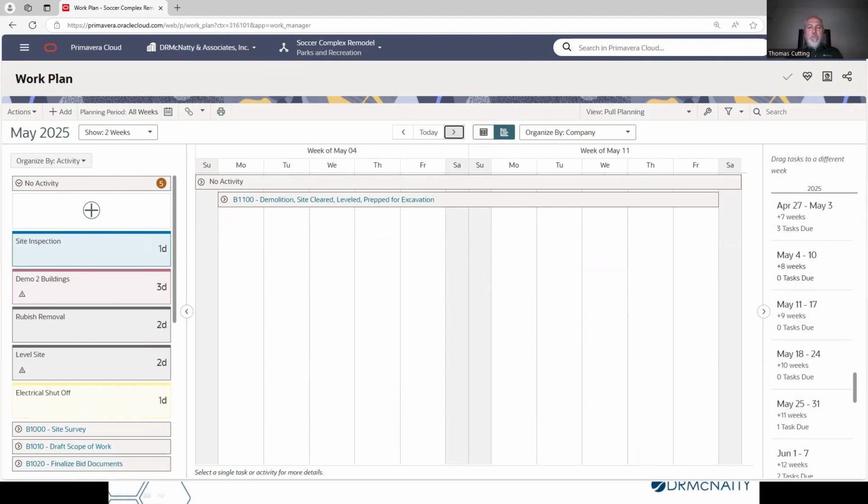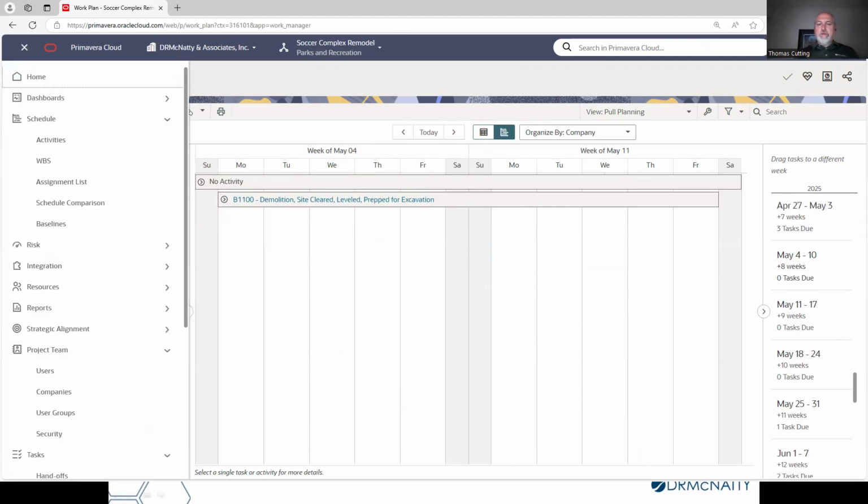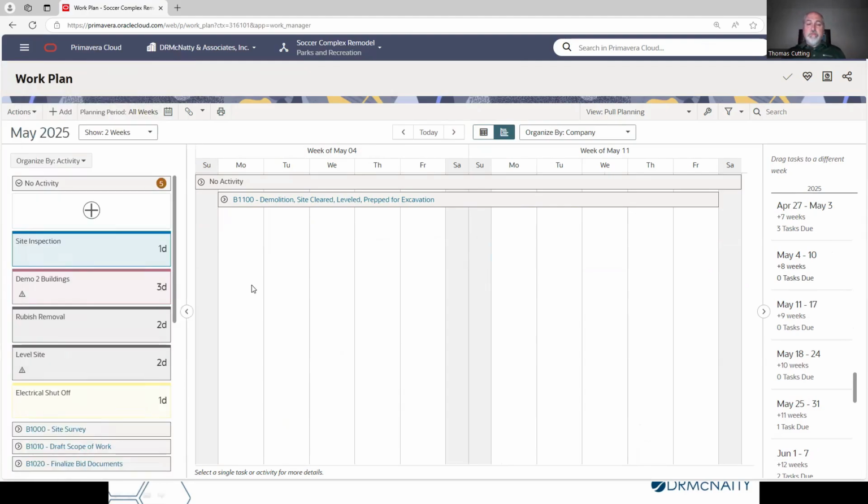Okay. So the way that pull planning works, or that part of lean management, it's a collaborative effort to define and sequence the tasks required to complete a specific milestone or time frame on the project. The process actually starts by clearly defining the milestone and working backward to identify the previous task needed to ensure the success of the final step.